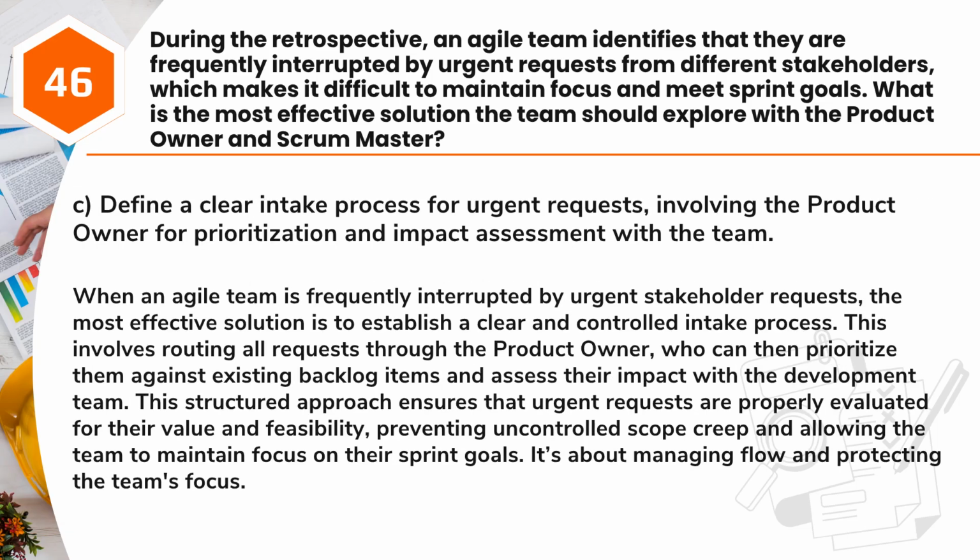Answer: C. Define a clear intake process for urgent requests, involving the product owner for prioritization and impact assessment with the team. When an Agile team is frequently interrupted by urgent stakeholder requests, the most effective solution is to establish a clear and controlled intake process. This involves routing all requests through the product owner, who can then prioritize them against existing backlog items and assess